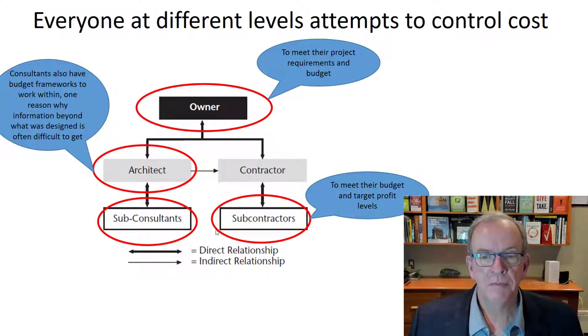And of course, the subcontractors have their own concerns, because most subcontractors self-perform the work themselves. That means they have a lot of employees, tradespeople, and trades are a variable cost. So if something's taking more hours, that's going to be costing them a lot more than perhaps they estimated. Conversely, if it's under, that's going to be a bonus for them. And contractors, as I mentioned, may or may not self-perform some of the work, as I mentioned in an upcoming slide. So that also depends.